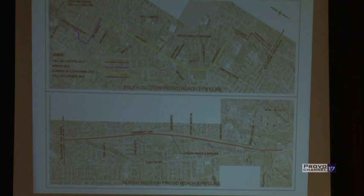Also, there's a further restriction that isn't shown on this map. When we did our environmental assessment with the people here, we put a further restriction that the area in front of this school, from I think 9th East to Birch Lane, is limited to June 1st to August 15th. It can't be the month of May. So there's another little stretch that has a one-month period also excluded.